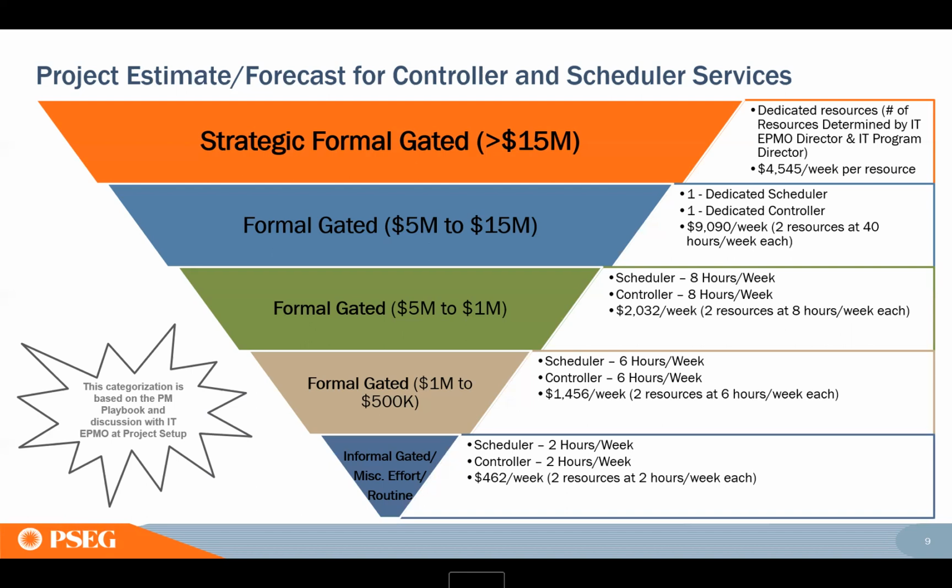I even went through the controller assignments, looked at the dollar amount sitting out in ServiceNow for each project, and then allocated controllers specifically based on the dollar value and the category of those projects. So I know it's being followed, but we may have some exceptions. Please send that if you have it.